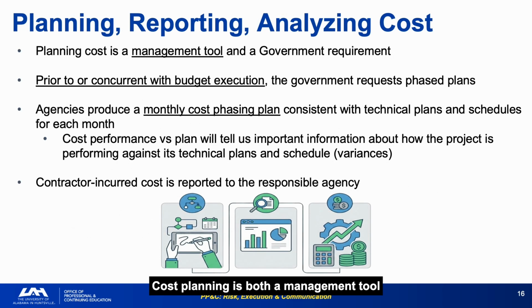Cost planning is both a management tool and a government requirement. Plans must be developed prior to or concurrent with execution and must reflect the technical plans and schedule of deliverables for each month. The phrase cost performance versus plan will tell us important information about how the project is performing against its technical plans, is the core rationale for cost phasing.